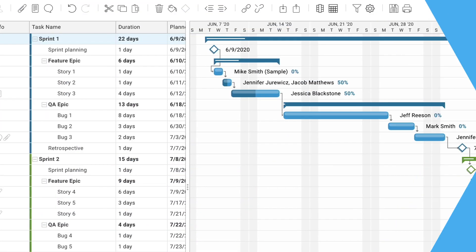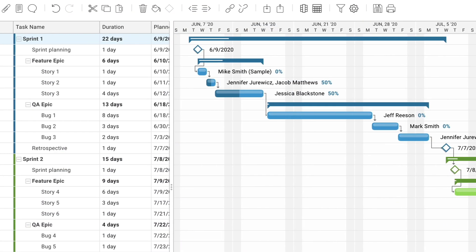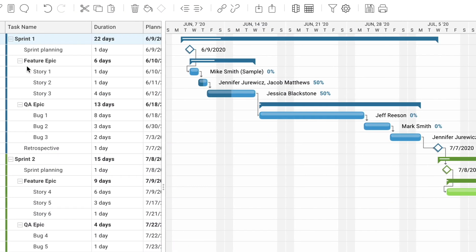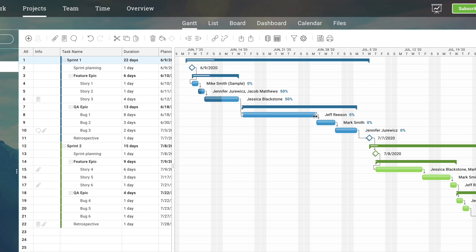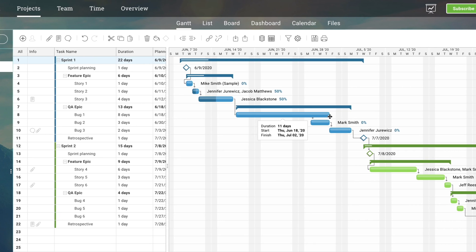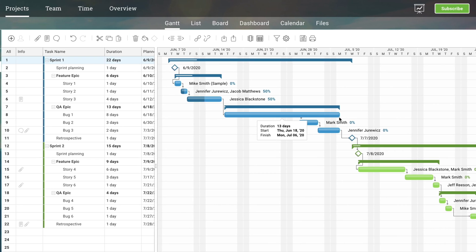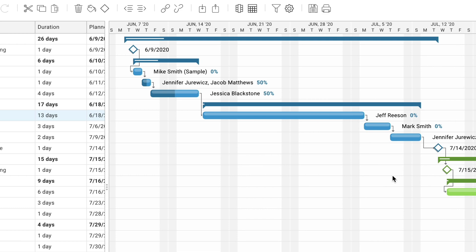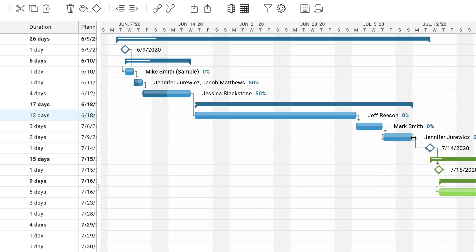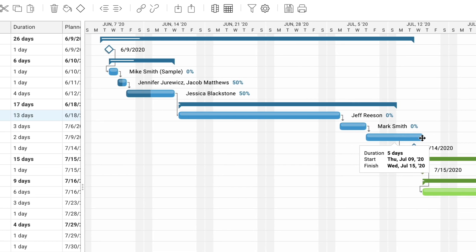Some project managers and IT teams may still prefer the Gantt chart, particularly for long, date-driven projects. Here the project can be broken down into phases and milestones, which are then represented in the waterfall timeline.